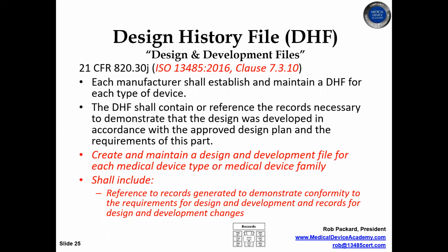You also are required to have a design history file. In the ISO standard, it says in clause 7.3.10 that you must have medical device files or design files. So that's where they've added that requirement. It wasn't in there before, but it's always been in the ISO standard. I'm sorry, it's always been in the QSR as 820.30(j). And all it is is a collection of all your design records for the entire project.